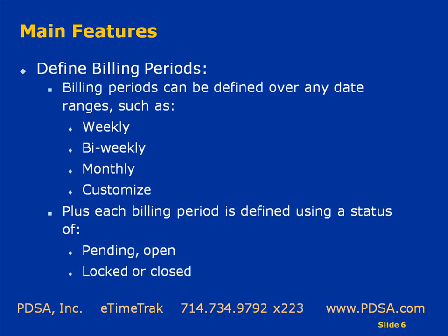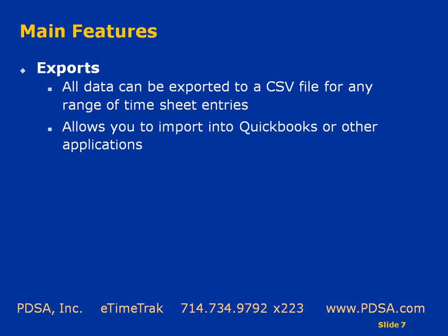After a billing period is completed, you can then lock it, you can validate it, make sure all the entries are right, you could correct entries, etc. Then you would close the billing period, and once it's closed, no changes can be made. A lot of flexibility in our billing periods as well.